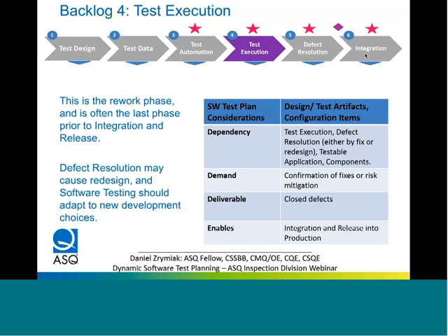If the test was done randomly without documentation, without clear reference to the requirement, then that defect will be harder to diagnose, and you will actually have to repeat the prior steps of test design, test data, automation, and execution. So what ends up happening is you have distinct backlogs of executing the planned tests and executing the defect resolutions. That actually competes with your time, and eventually, at the end of the project, the defect resolutions take on a higher percentage of the time up to completion.